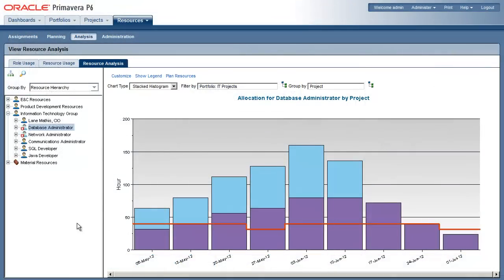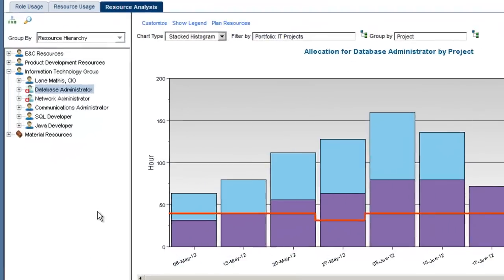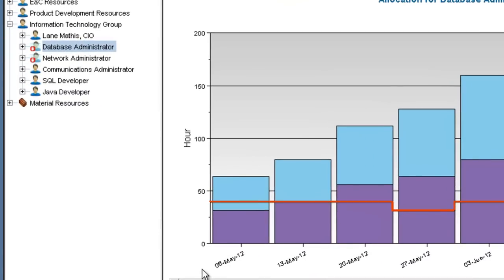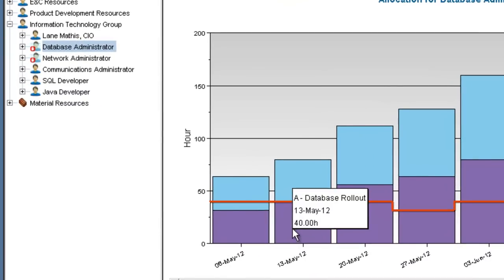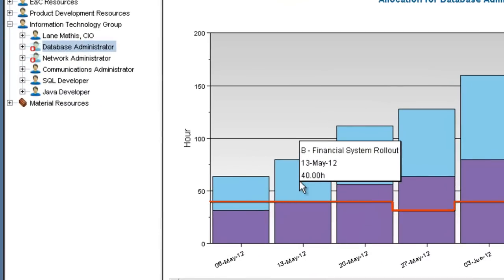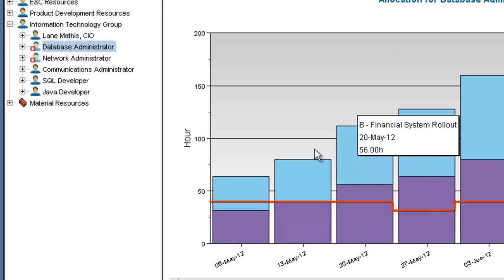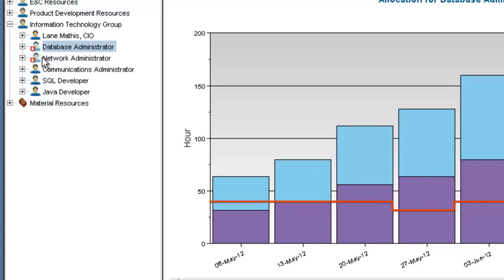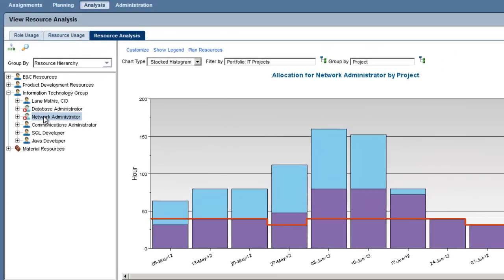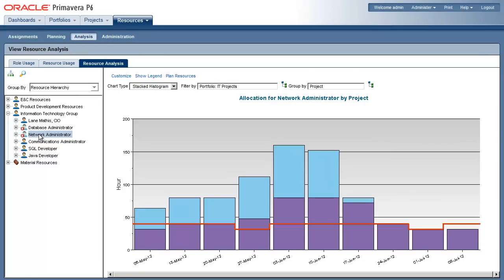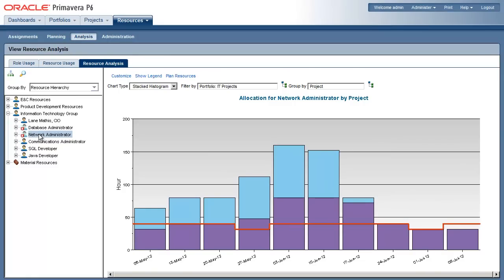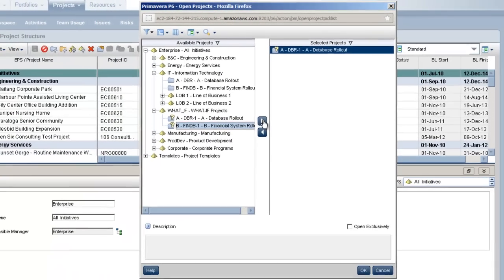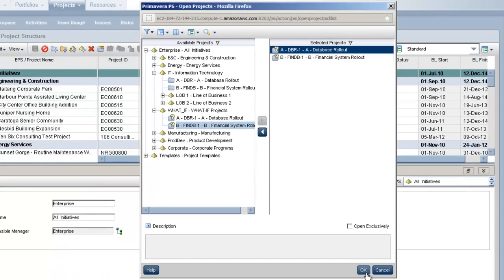In the resource analysis page, we can see that our resources are overloaded across project A and B. In this view, a dot on the resource icon tells us that the resource is overloaded on one or more projects. Our database administrator and network administrator are in high demand for these projects. This will impact the duration of the projects unless additional skills can be hired in. Our next step is to run the resource leveler and see what our worst case scenario looks like.